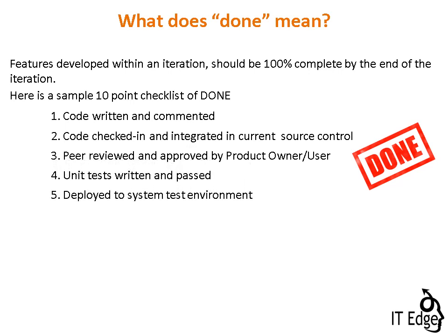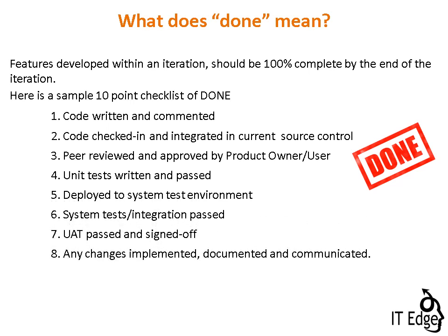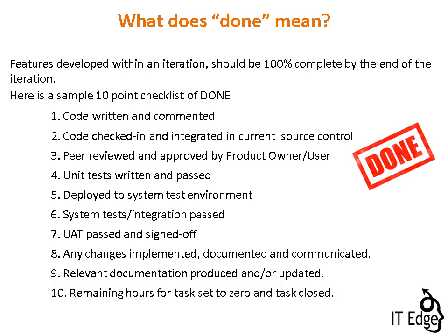5. Deployed to system test environment. 6. System test integration passed. 7. UAT passed and signed off. 8. Any change is implemented, documented, and communicated. 9. Relevant documentation produced and/or updated. 10. Remaining hours for tasks set to 0.